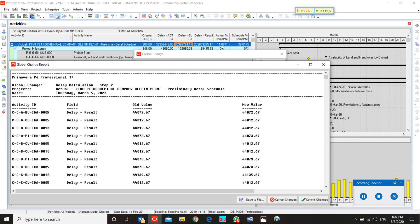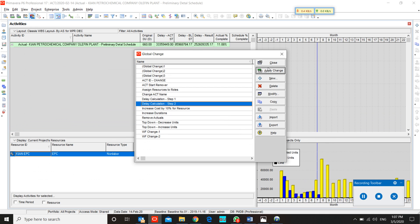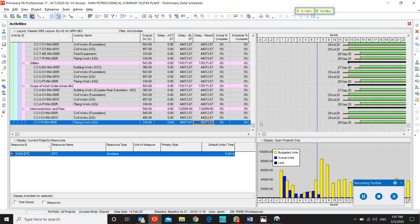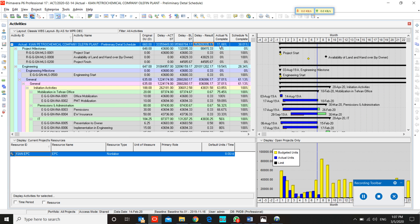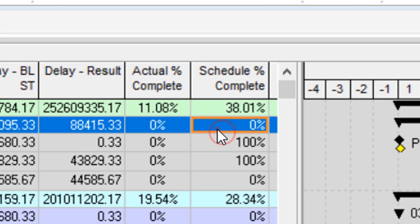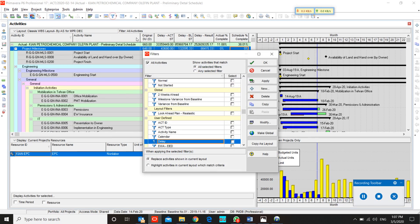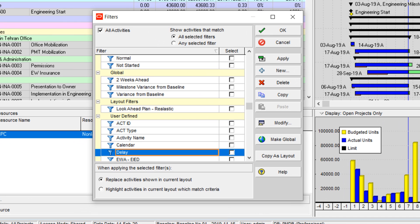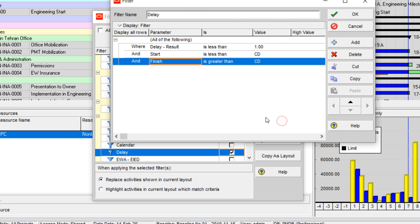This is our delay result. I committed the change. As you can see, our actual percent complete is 11.08 and our schedule percent complete is 38.01. So how can I report it by filter? Because I changed actual start and baseline start to a number and made the delay result by subtracting actual start from baseline start.